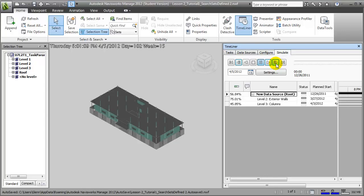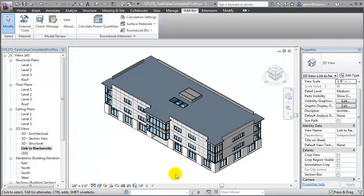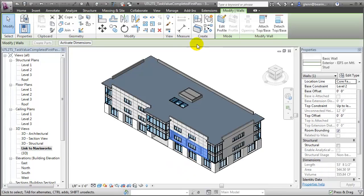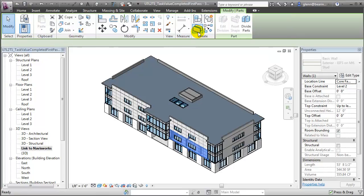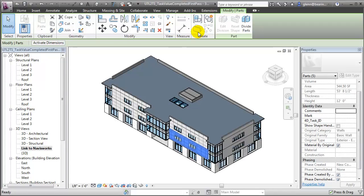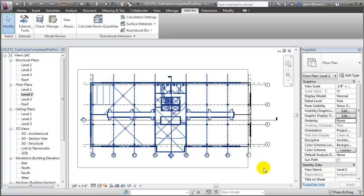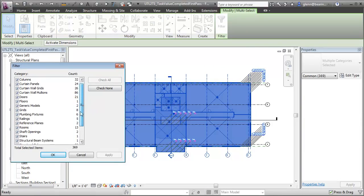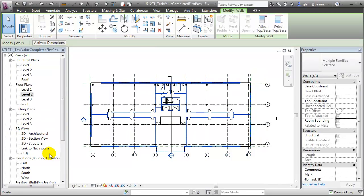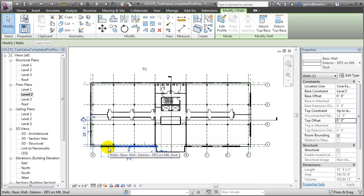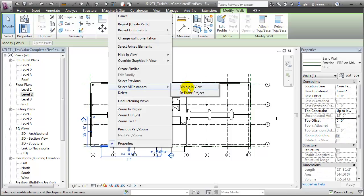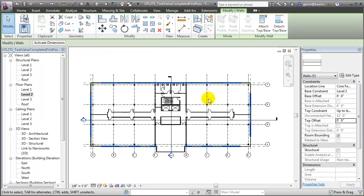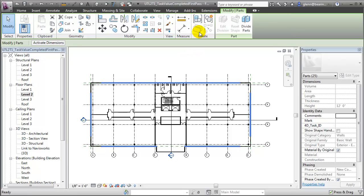To improve the accuracy of our construction simulations, we can take these multi-layer building elements and break them down into their individual parts so that we can place the parts independently. To do that, let's return to Revit and create parts for some of those elements. In Revit, it's very easy to decompose building elements into parts. We can select individual elements and then go to the Create Parts tool to break down that element into its component parts. We can do that one element at a time, or it may be more efficient to switch to a different view, drag to select all of the elements, then filter to select only the walls.